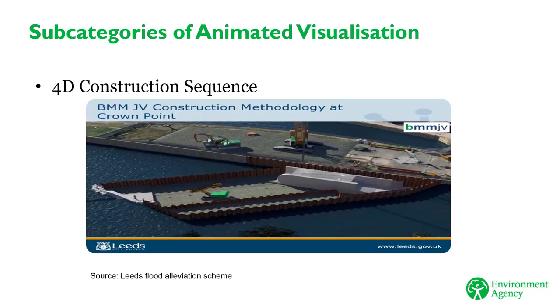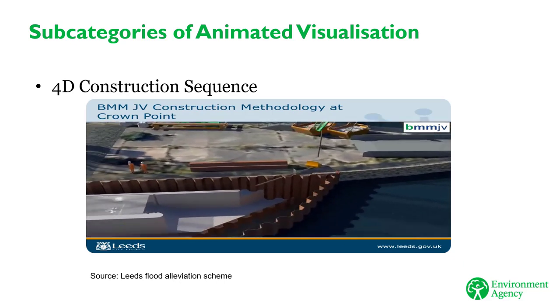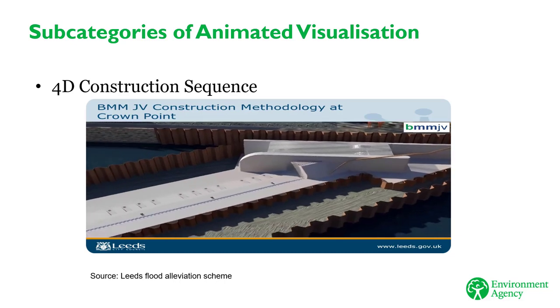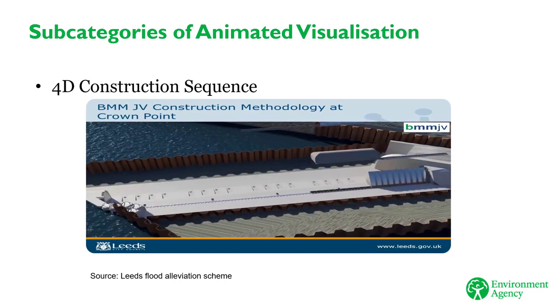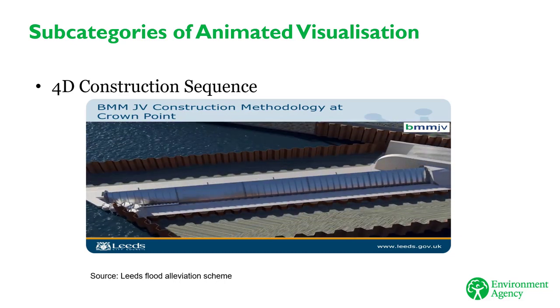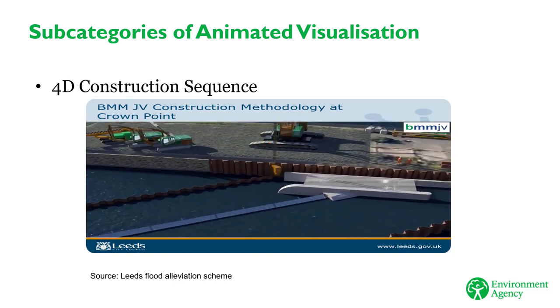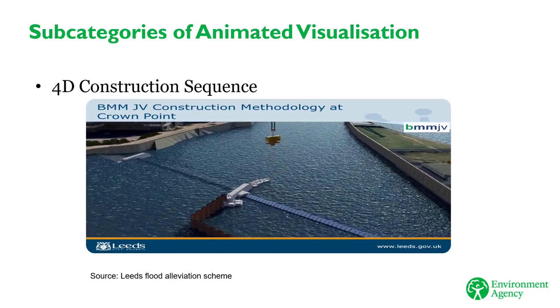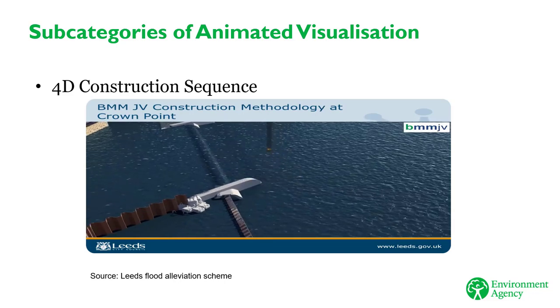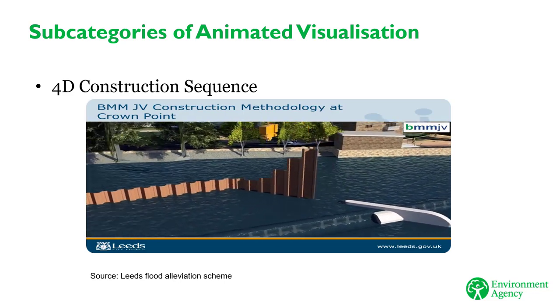A 4D construction sequence animation provides interactive insights on how construction work elements come together over time. This visualization visualizes the construction program to better communicate complex scheduling activities. It provides the project team with a better engagement tool for efficient scenario planning, as well as highlighting and mitigating health and safety risks.